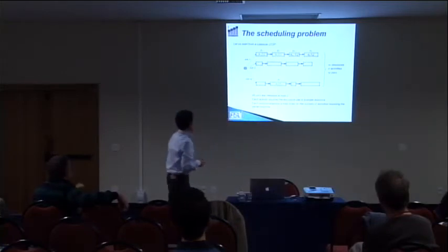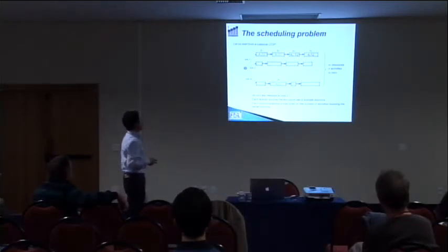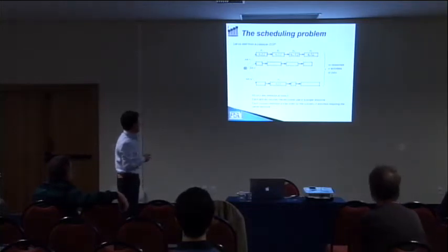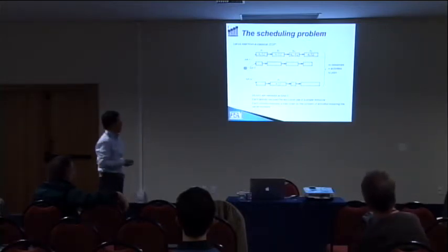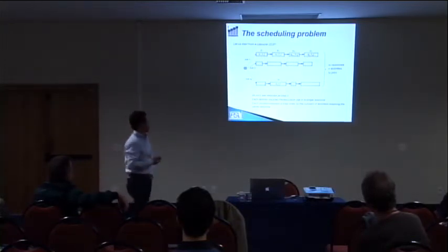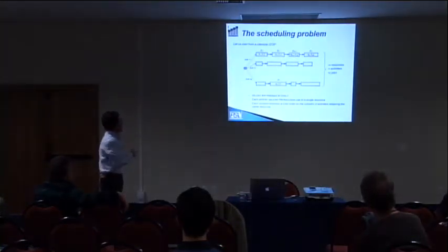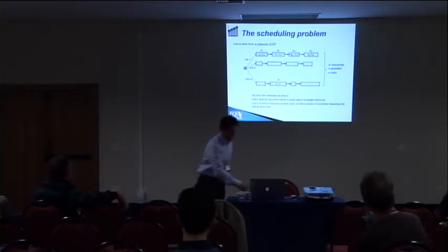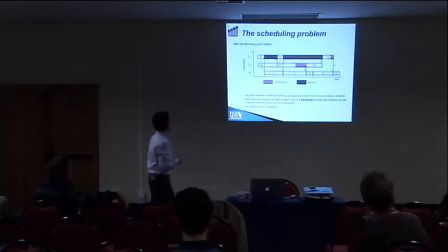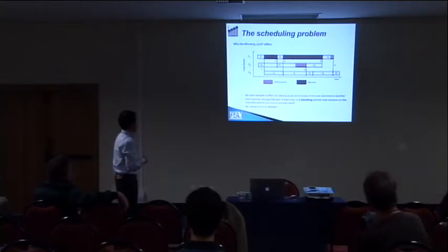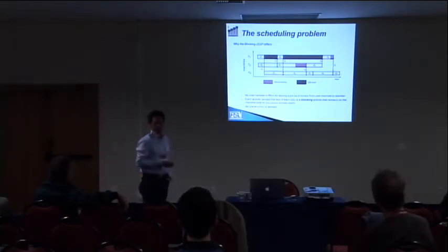So basically, I want to present the blocking job shop scheduling. To understand it, we start with the classical job shop scheduling, which, as is well known, is a set of jobs. Each job is a sequence of activities. Each activity requires only one machine, and one machine is required only once per job. The goal is to find, for each resource, for each machine, the total order of the activities which require the resource and which satisfy the ordering constraints.